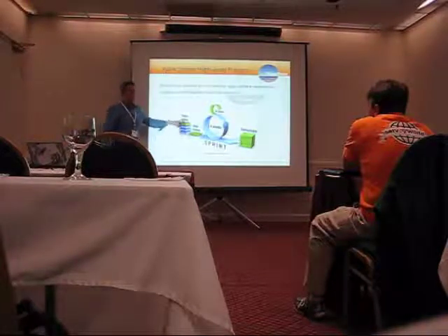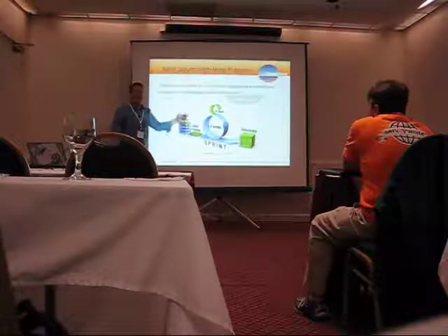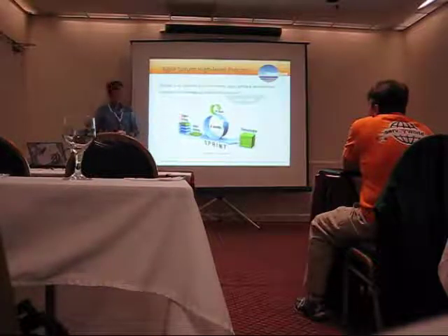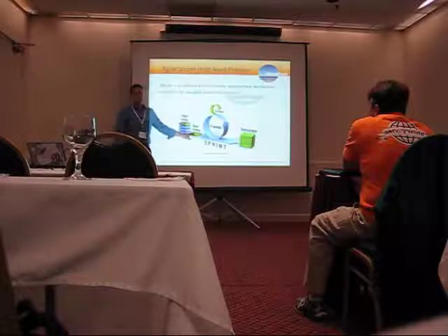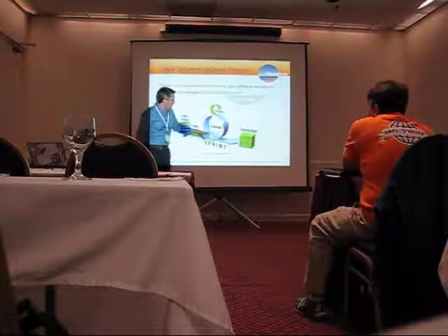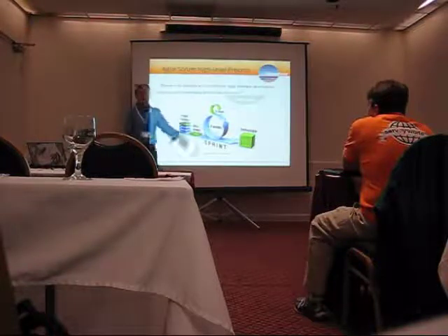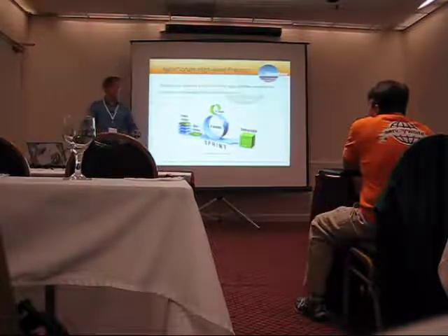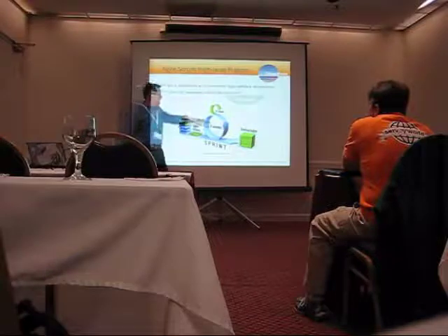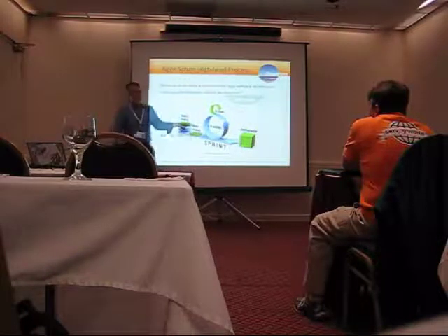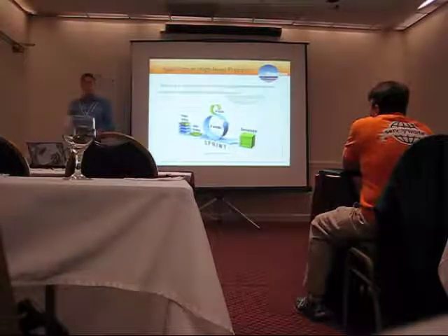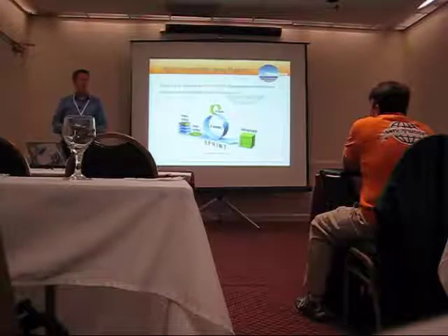And then you take the highest priority items off the product backlog, whatever you think you can finish in 2 weeks, that becomes your sprint backlog. That's your to-do list for your sprint. Then you iterate the sprint 2 to 4 weeks-ish, and you have a meeting at least once every 24 hours, in general cases that results in a deliverable. So that's kind of like a picture of what Agile Scrum is all about.